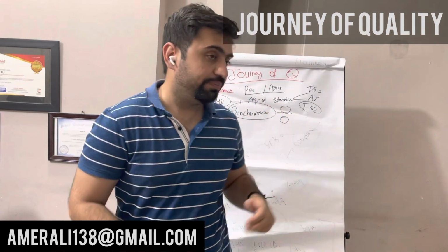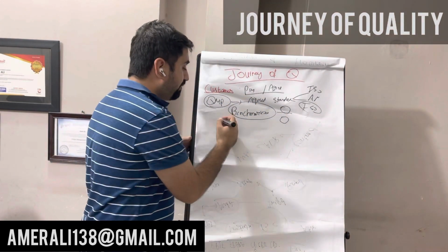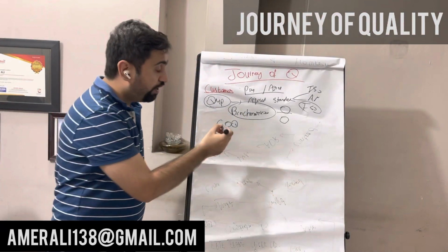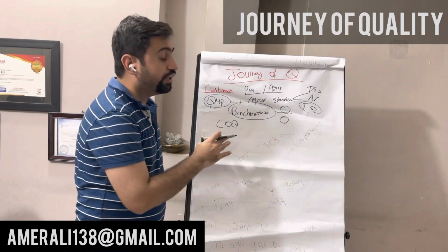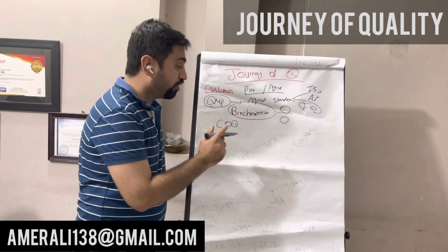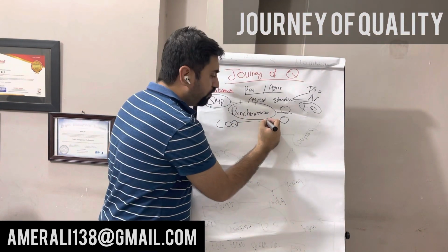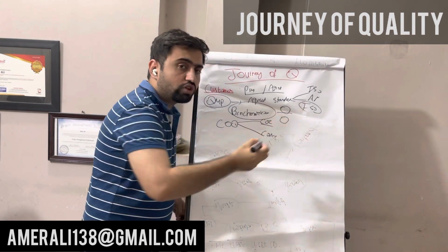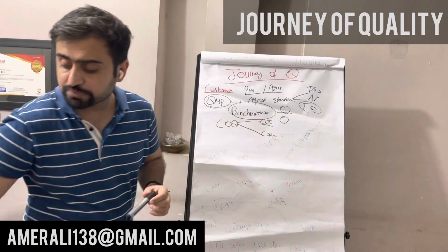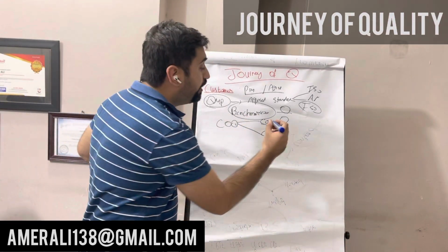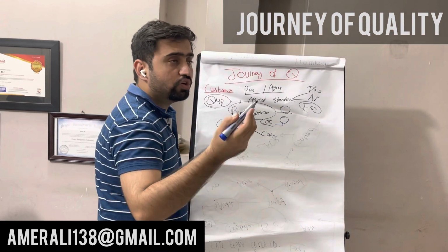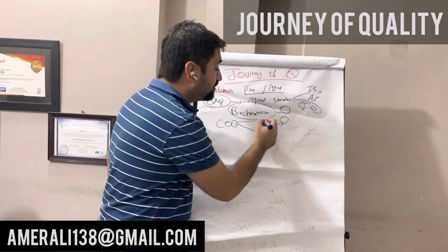So benchmarking. Then also in the quality management plan, we need to see how much the cost of quality is. Very important too. Cost of quality. How much cost you are going to spend on quality. It contains cost of conformance and cost of non-conformance. Cost of conformance is the money spent in order to avoid failures. So all those training, appraisals, NDT testing come under here.